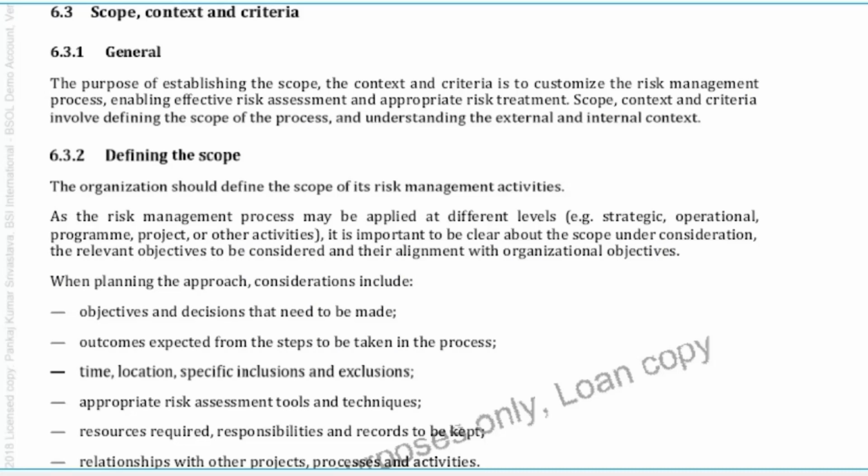Now, very important, and this is where I will use the communication and consultation approach. I will seek the views of various stakeholders to understand my criteria to evaluate the significance of the risk. How do I decide whether the risk is high, low, medium, very high, catastrophic? On what basis do I say this risk is catastrophic and I cannot accept it, so that I can take a decision? If this risk is within my appetite, do nothing. If it is not within my appetite, how do I come to know the significance of the risk? What is the criteria to evaluate the significance of the risk and to support the decision? My decision is, should I accept the risk? Should I mitigate the risk? Should I transfer the risk? That is the decision I have to take.